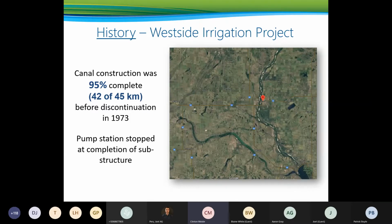And then at the potential site for Conquest Reservoir, one embankment of three was completed. And then when you go back towards the lakeside at the pump station, they completed the concrete work. So they did the intake, the wet well, and the pump station floor. Since that time, a group of farmers in the McCrory area formed an irrigation district. What they then did was install a small ditch plug at about kilometer 23 in the canal, and that allows them to pump water from that canal and irrigate 3,000 acres directly out of the canal.